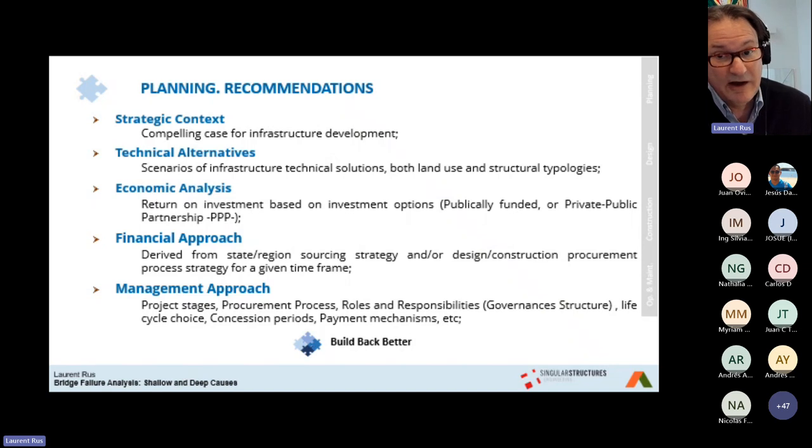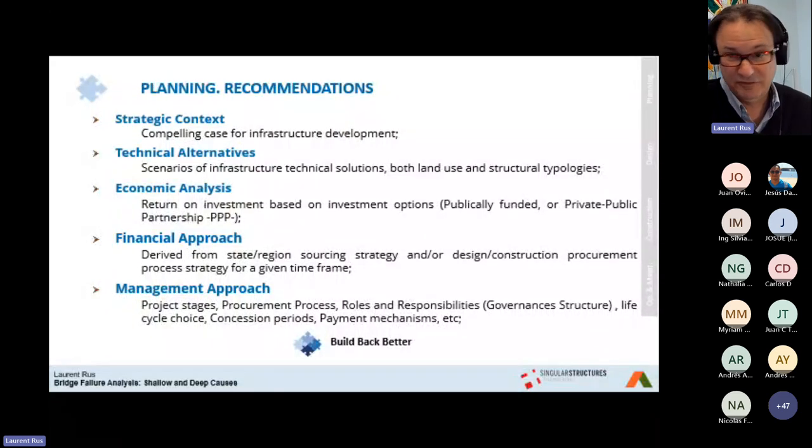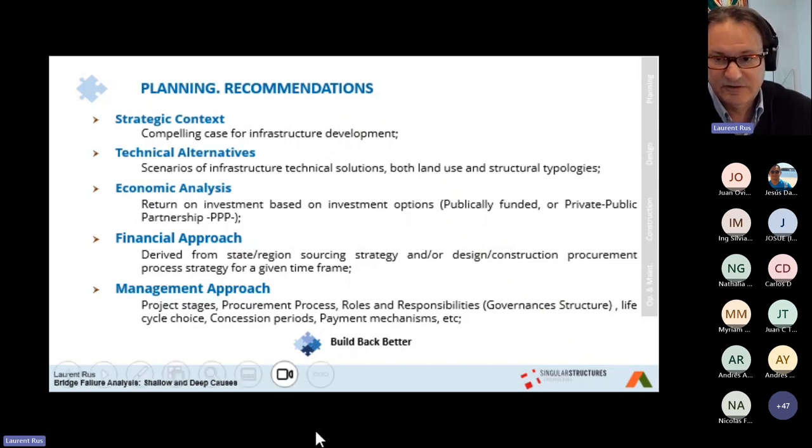because you know how decisions are then made in terms of the level of the foundation, the type of foundation, the phreatic level, if you have water or if you don't have water, or if it's a large span bridge, in terms of whether you have ship assessment, navigation channel assessment, clearance. So the lack of that information at an early stage is already a sign that not all the factors have been taken into account, and therefore attracts risk into your process, into the failure.